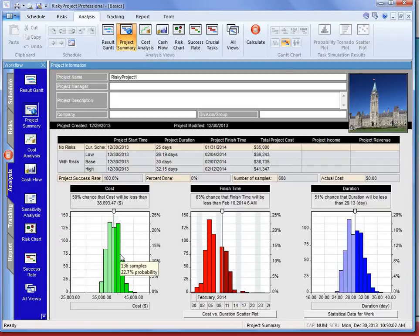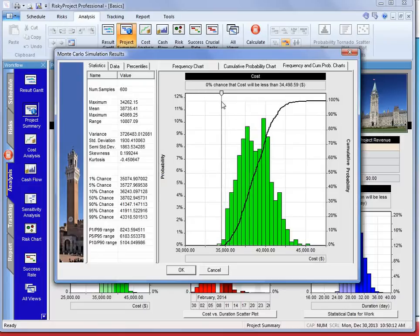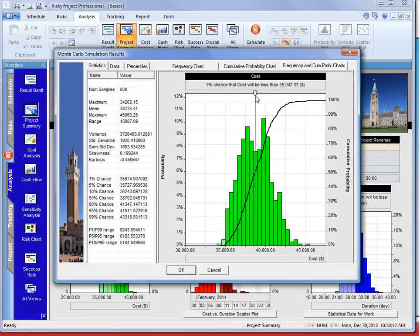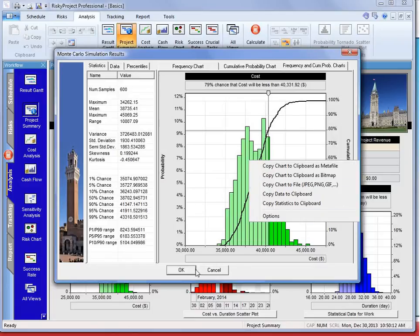Taking a quick look at the three major histograms — cost, finish time, and duration — this is the integrated frequency and cumulative probability chart. We can see what would be the chance of meeting the original $35,000 budget: almost nothing, about a 1% chance. Our P80 is around $40,000, so our contingency at this point is about $5,000. Any of these charts can be pulled out and copied, or reported using the statistics report mentioned earlier.